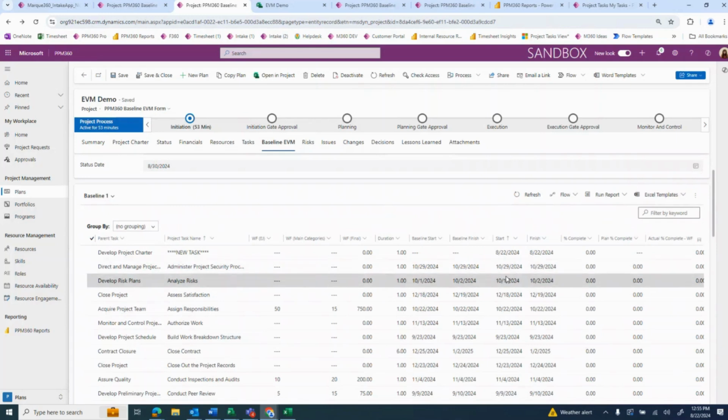And just to understand the way that your Jira works, similar to Microsoft Project, it lets users log over the initial effort without approval. Yes. Okay. I mean, we have an approval flow, right? We can toggle that, but yeah, in some cases that happens, yes. Okay. So this would be a good way to check that effort variance, essentially, how much time was actual versus planned, and then you can go as far as to create a custom report for that, and you could track by resource across all projects.